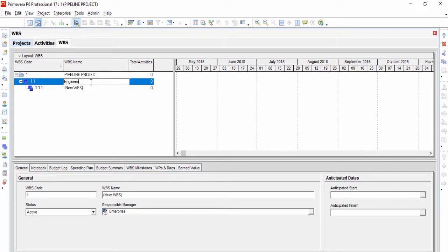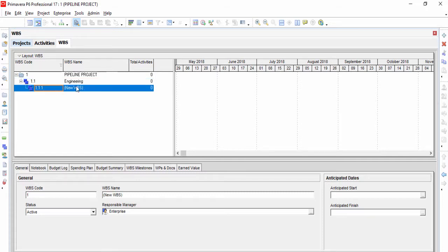Then select Edit, Add again, which will create a child of the engineering element. Type the work breakdown structure level and work breakdown structure name of each element.